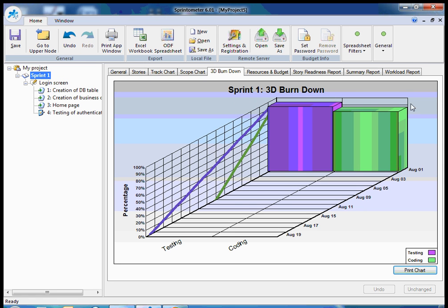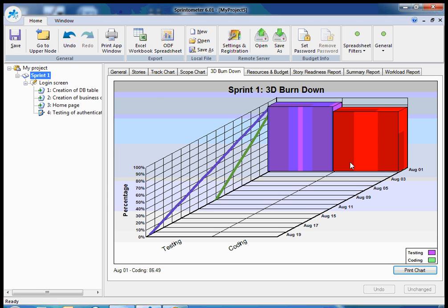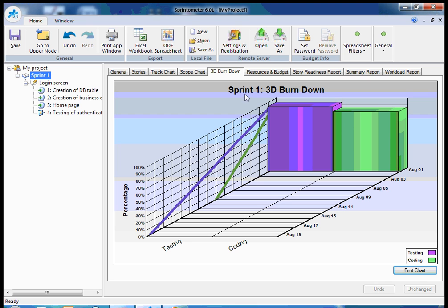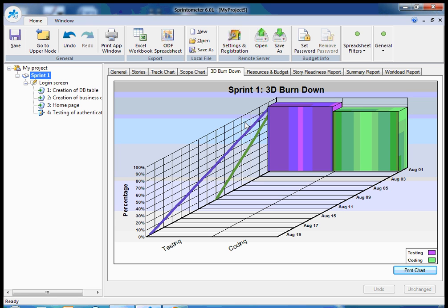Here I can see simultaneously burndown charts for all human resources of all types. For example, in this specific case, I have programmers and testers on my project. So I can see prediction for work for developers, it's the green line, and I can see prediction and progress of work for testers, this is the violet line.